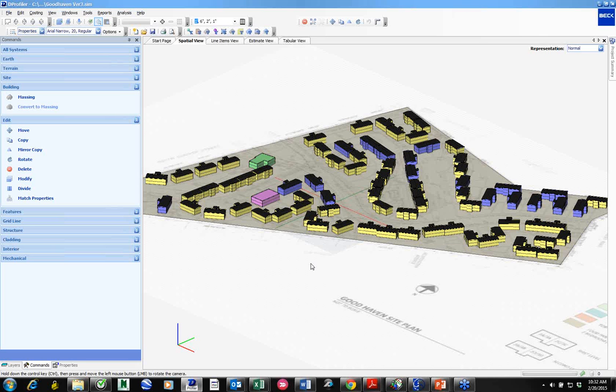I do see the value in the long run, because now I have this base estimate, and any changes that I make, I can save as a different version, and now I can start pulling up those variances, and that's very powerful. Especially if you're looking at 2 months of pre-con or 8 months of pre-con, you're going to do multiple estimate iterations, and to be able to compare between them is very helpful. So it was a little more efficient. I would say maybe 10-15% initially, but as we go through, I can definitely see my efficiency growing, because I'm able to compare these estimates.